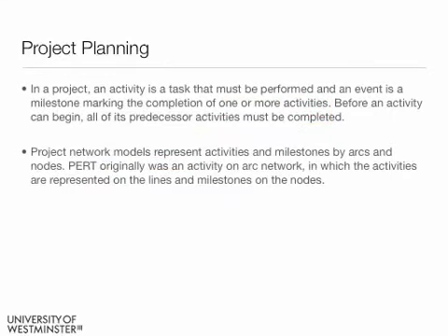So we need to think about exactly what we're planning. We need to think about how we're going to have milestones. We need to plan what these milestones actually are. What are we completing? Are we completing a product for the project, a physical, technical thing, or are we talking about a project product, something that we have to produce to manage the project? So we can have milestones for two different things, the project and the product.